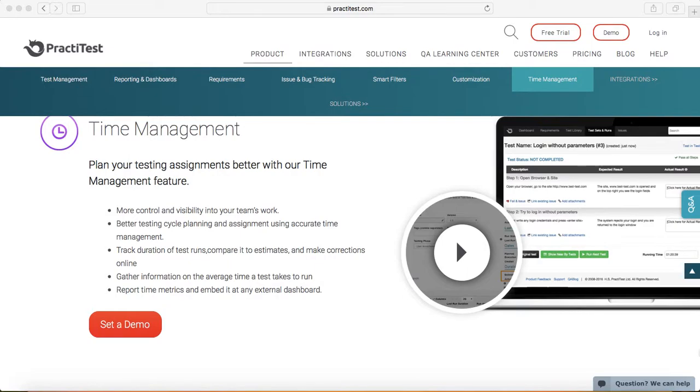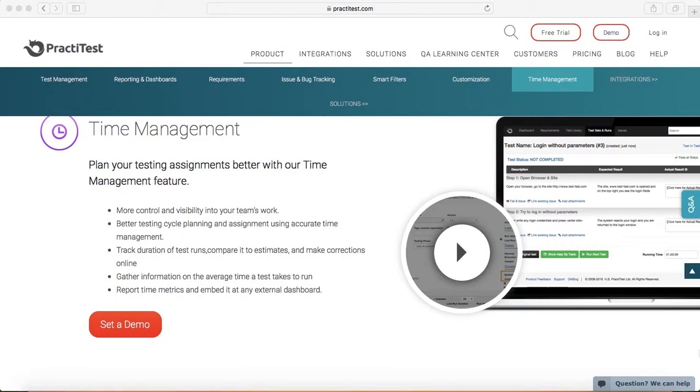For example, you have a set of test cases and you have estimated 15 minutes or 20 minutes for a particular test case to be executed. Once you log that estimated time, and then once the actual execution starts for that test case, it will also capture the actual time taken to pass that test case.